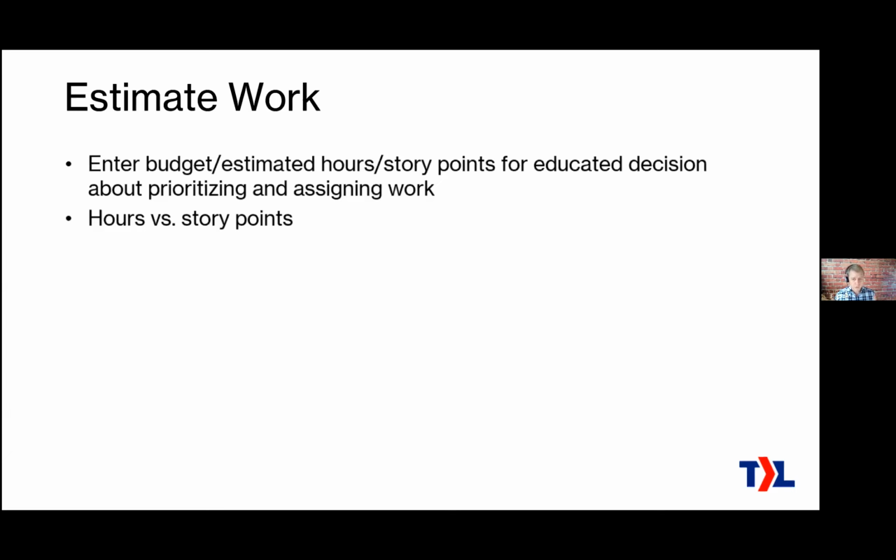Definitely the hours, though, like the actual hours it will take to complete a ticket, that does depend on who will do that work. Okay, so that's one of the reasons why they're different, why you might choose one over the other. Story points are a more advanced technique, so I wouldn't necessarily recommend you do that unless you're educating yourself from other content on how to do Scrum, because you're all in on Scrum or something like that.